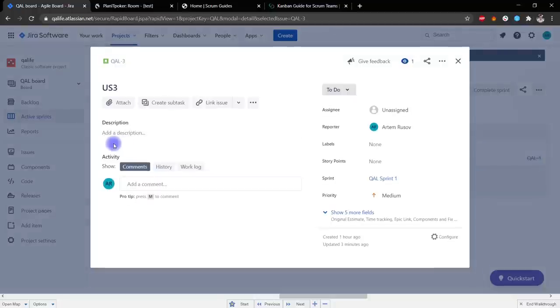And in the user story itself, we have, as we see, a story point. That is, when we have evaluated this user story, we add this evaluation. Because this evaluation later influences various graphs and reports so that the product owner and the Scrum Master can understand how far we are moving towards the goal, whether we are on time or not, and can later suggest some corrective measures in order to improve our work.